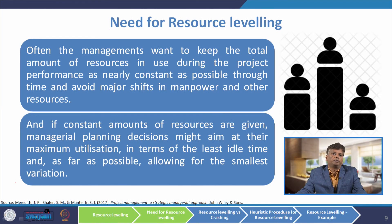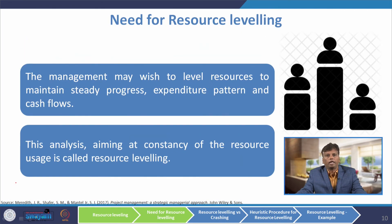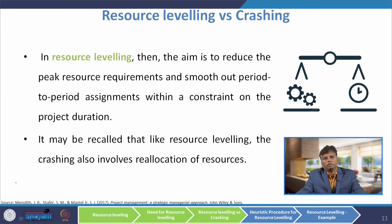Management wants to keep the total amount of resources in use during project performance as nearly constant as possible through time and avoid major shifts in manpower and other resources. If a constant amount of resources are given, managerial planning decisions might aim at their maximum utilization in terms of least idle time and, as far as possible, allowing for the smallest variation — that is why leveling is required. Management may wish to level resources to maintain steady progress, expenditure pattern and cash flows. This analysis aiming at constancy of resource usage is called resource leveling. The aim is to reduce peak resource requirements and smooth out period-to-period assignments with a constraint on the project duration.